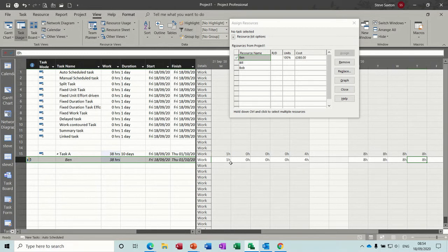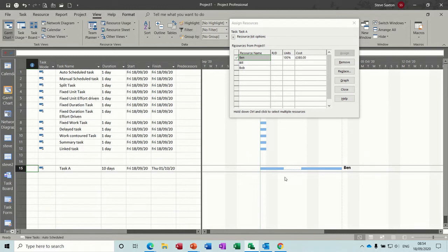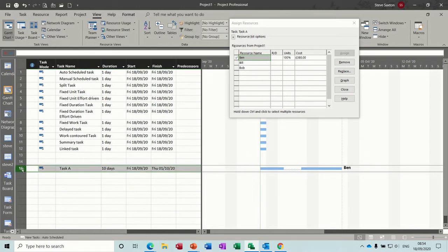And on the actual Gantt chart, if we go back to the Gantt chart, that's given like a split task, because there's no hours work there, so Ben would better work on another task there. So if you want to be really accurate in terms of man hours, that's the way to do it in task usage. But that's that one, let's get rid of that.